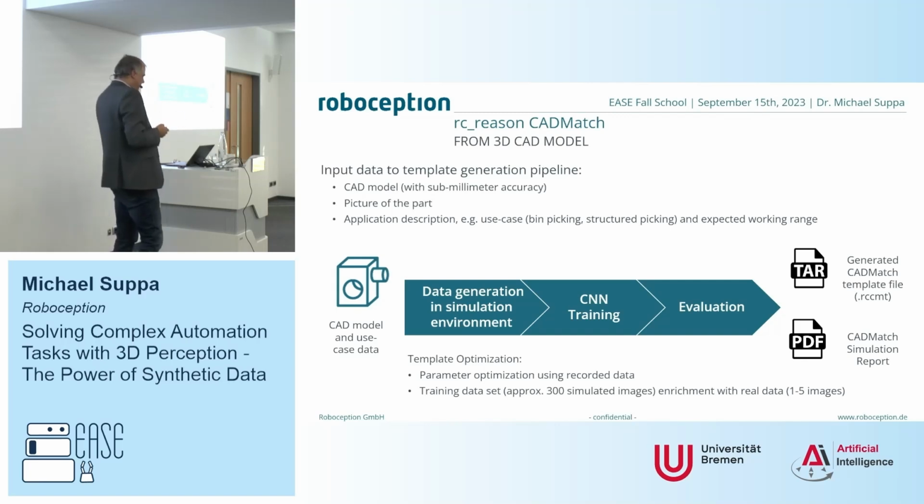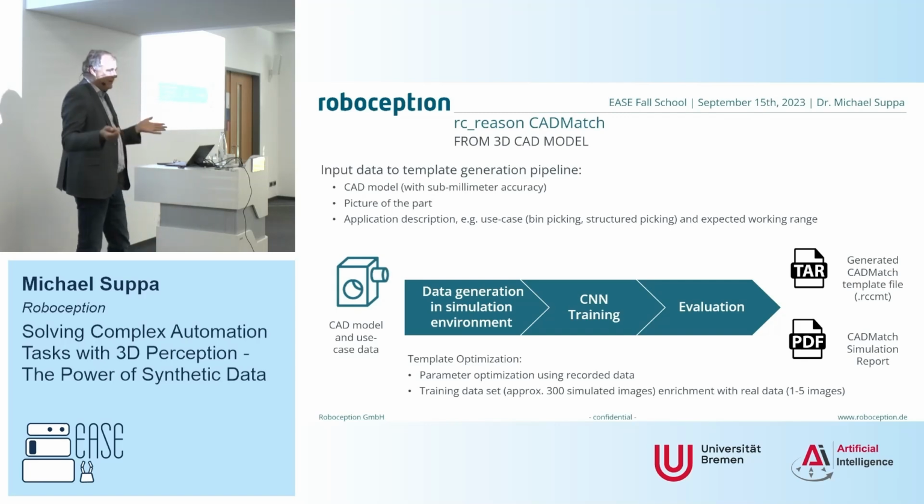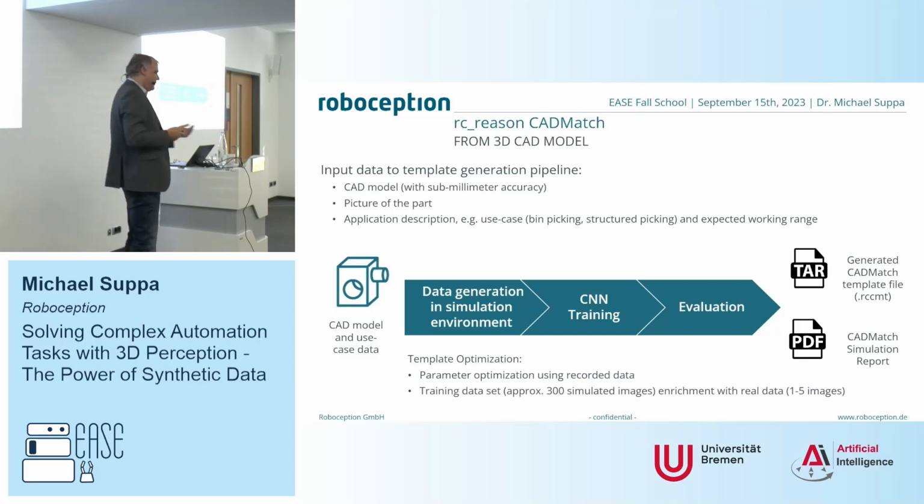So you say, this is the accuracy you can reach, and then we can say, hey, customer wants a micron. We say it's 2 centimeters. Okay, we will not have a deal here. So basically, we can judge quite early in the process before seeing the real part if this is a feasible project or what the project risk is.